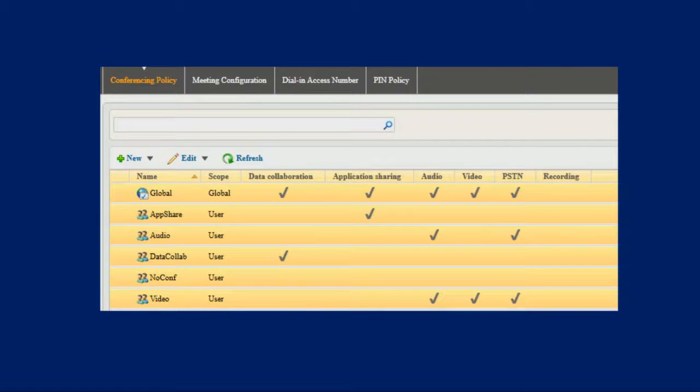As a real-life scenario, we fired up about 10,000 users one night, and we had missed in our little project plan, we need to take care of this. And we had set the global for everybody, and the VP of marketing showed up with his iPad going, I want it. It's because the Mac guy down the path, his mobility lit up, because mobility, which is hiding behind the weeds, is turned on by default.